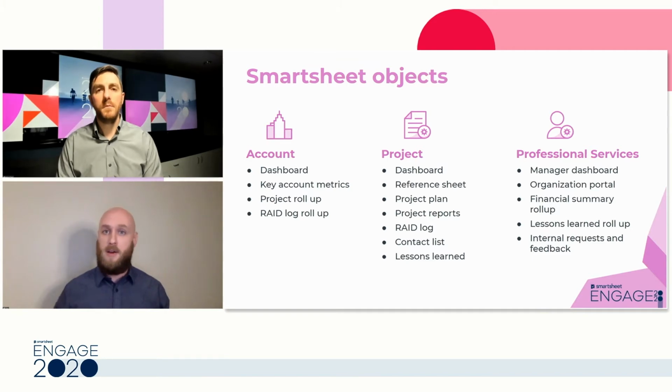So ideally, every week when we have our call, or however many times you're meeting, we pull this dashboard up. It's got stats about how many tasks are completed, what do we have coming up, what's past due, what our RAID log looks like. All this stuff is just on one screen. So that's even customer facing. Your customer and your implementers are talking together and looking at the dashboard status of their projects.